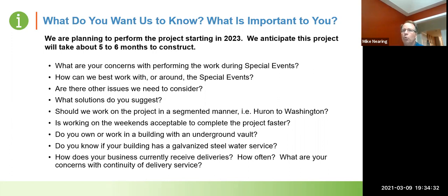Those will be scheduled with you in advance, typically at least 48 hours in advance. If you're a business, such as a restaurant, we clearly understand that that's very important to you, so we'll be working to identify those needs and those times.